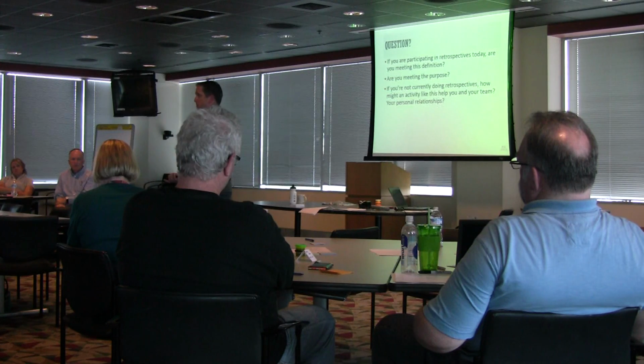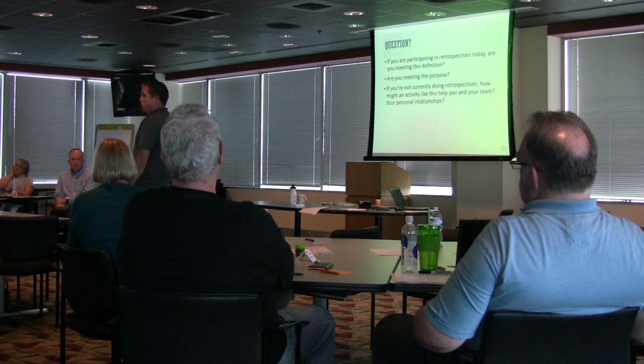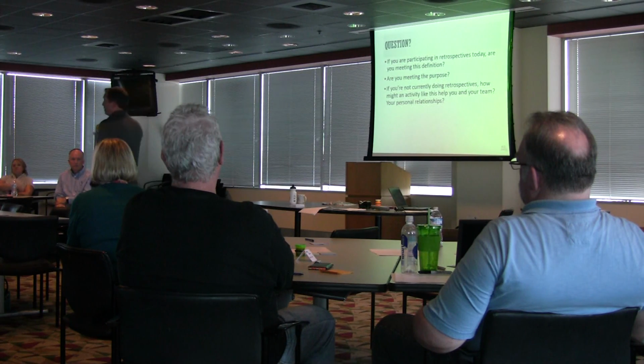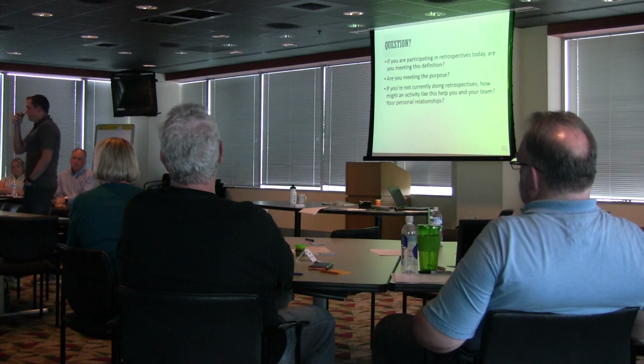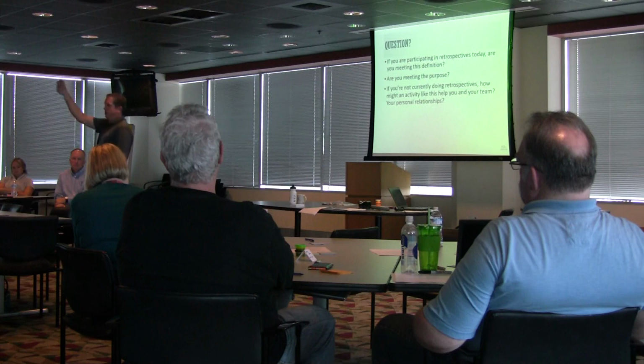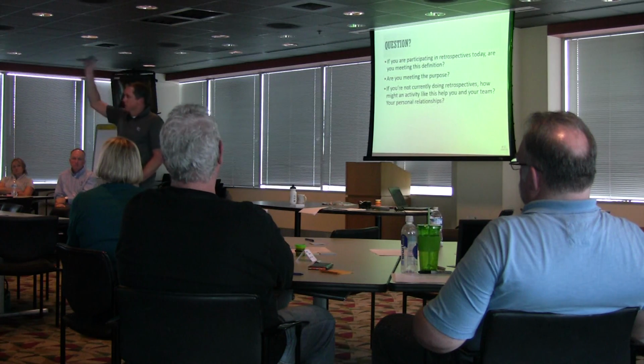We talked about something that was important. I think it's a great activity. But we need to come back and say, here are the things we said we would do. Did we do them? How did we do them? Sometimes I may do a grading system because it's kind of fun, kind of like the points where we throw the cards up. I'll have an A, B, C, D, F or something. Say, let's grade it.